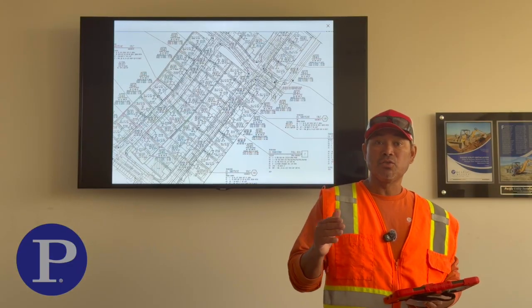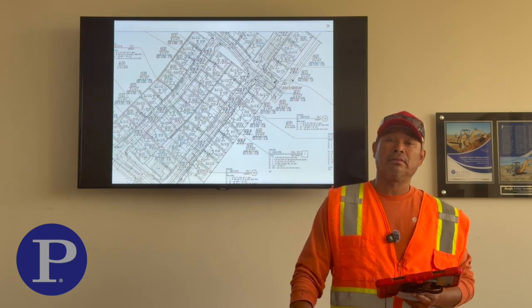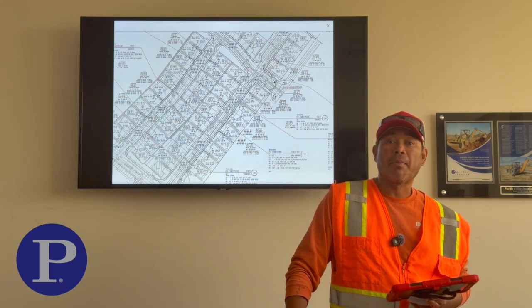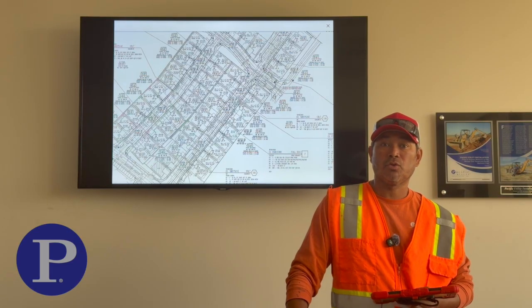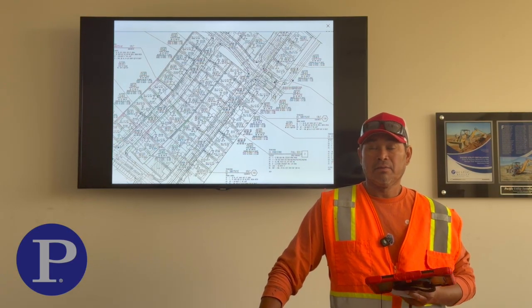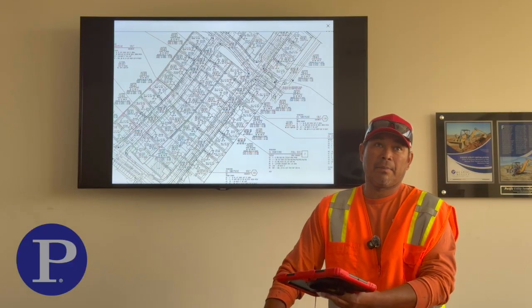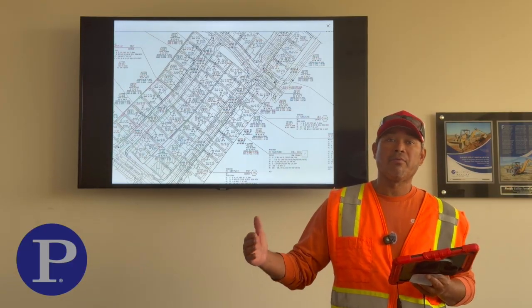So imagine if you ordered 20 extra 90s. You're already ordering 300 feet of extra pipe that is not going to be used. So you're already using a lot of your budget, because for each job there is a set amount of money that we have for every product.